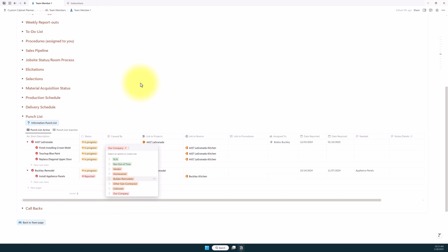And so that is everything about the punch list. I will make the distinction in both of these videos, the callback and the punch list. A punch list is you've gone out to install and you just can't finish. Callback is the homeowner or the builder or the remodeler has called and said something is wrong. And you'll have a lot of the same type caused by and status type approach to it, but it is a different thing. So that's it for punch list.